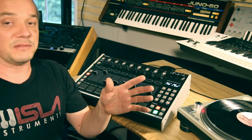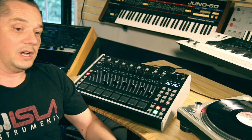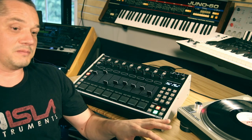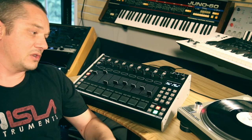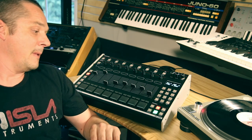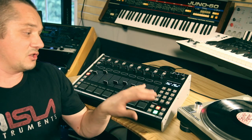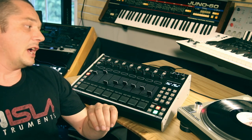Some of the things I've done to mitigate this: we're going to have 5 people doing the assembly on the SP-2400, which is much more than the usual crew. We've sat there over the past couple of weeks and built a huge stock of CordBots, so those customers are taken care of as well. And also, this short delay gives us a chance to get more stuff into the firmware that we wanted in there for launch, and get things tidied up a bit more.